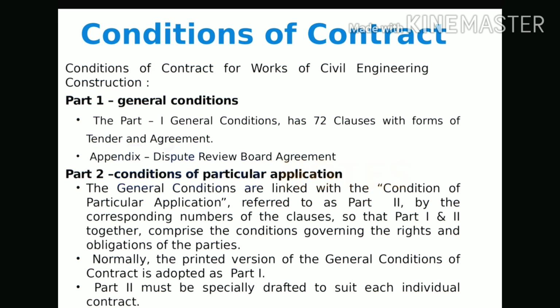Unforeseen natural calamities like floods and earthquakes are beyond the control of the contractor and may lead to financial and time loss. The contractor should obtain an insurance policy for such risk. In the event of financial or time loss, the contractor can claim financial compensation from the owner for risks which are not insurable, and an extension of time for all such risks.